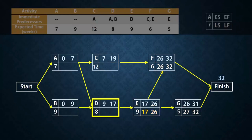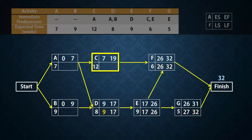D has only one successor, E. So the latest finish time for D will be the latest start time for E, which is 17. And the latest start time will be 17 minus 8, which gives 9 for D. Activity C has one successor, F. Therefore, the latest finish will be 26 for C, and latest start will be 14.